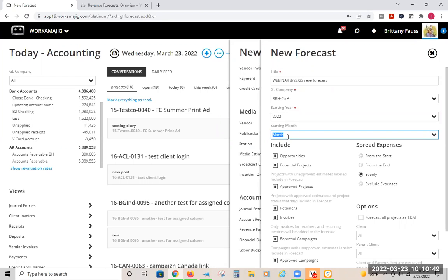I mean, there is a prior option in there. It'll show you what would have forecast in the months previous to this, but you're not actually seeing it broken down by month. So definitely something to be mindful of is, when do you want this to start? And if your project started before this month, know that those forecasts would actually be in a column called prior.